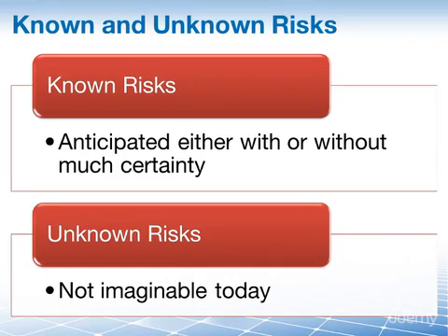For instance, in the year 2005, who could have imagined Lehman Brothers Bank would break down, that the US government would not save them, and that this would be the beginning of a global financial crisis? This was unknown and unimaginable at the end of 2004. The unknown risks are, of course, those that will cause you a headache later on, and for which you will then need to find a workaround once they pop up. The only thing you can do is put aside some contingency reserve and hope that it will be sufficient.